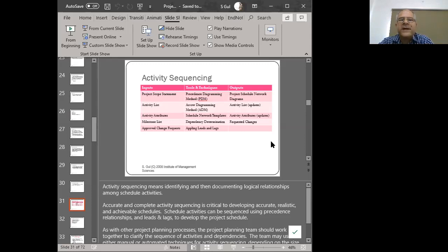There's another form of a dependency that could also exist, which is the thought of a soft dependency versus a hard dependency. Soft dependency means that certain things have happened, certain other things have to begin, but certain approvals have to be gained once activity A has finished and before B can begin. So us waiting for that approval process to run and gaining that approval is going to take a certain amount of time, and that lag that we encounter between two activities is basically a soft dependency.